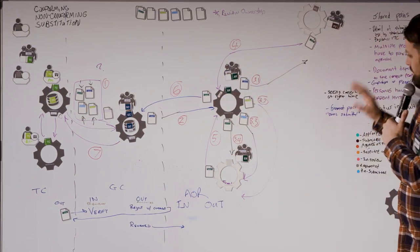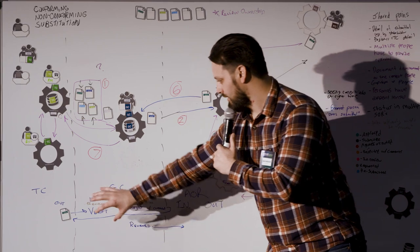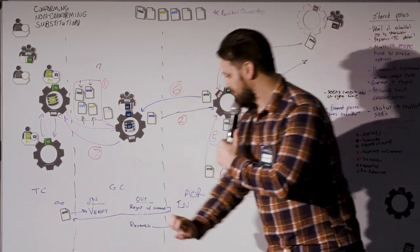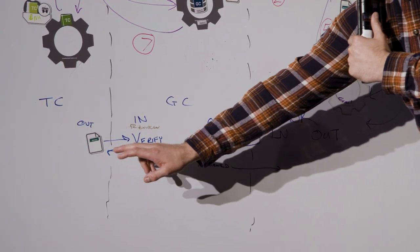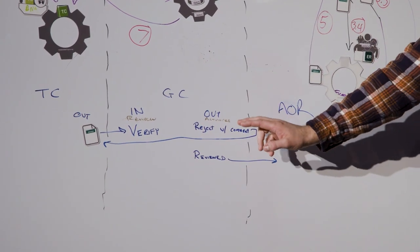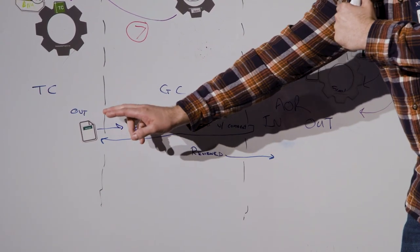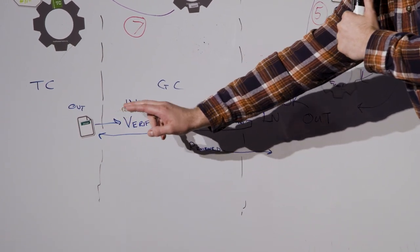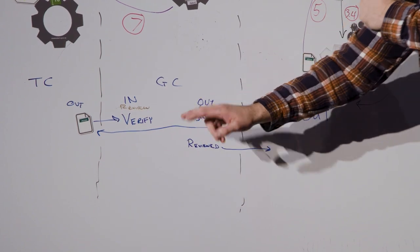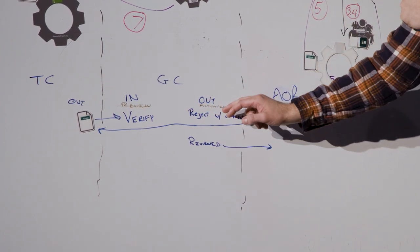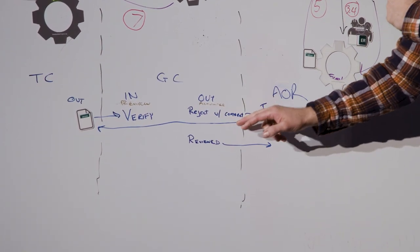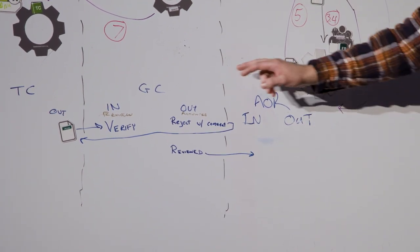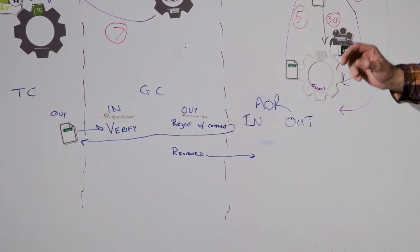What we came down to is each section or area has an outbox and an inbox. Going from the trade contractor to the GC, you have the outbox to send the submittal package over. The GC gets it, reviews it, and then sends it out for review to the architect of record — so there's an in and an out for each piece.